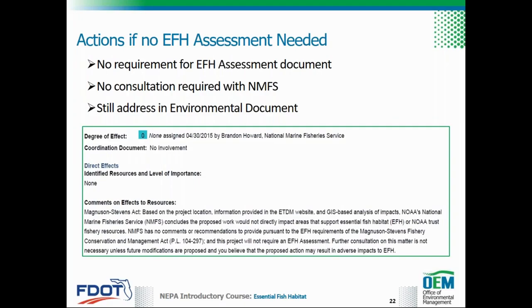If the project is located outside of areas where the Magnuson-Stevens Act applies, an EFH assessment is not required and consultation with NMFS is not required. For projects located in areas where the Magnuson-Stevens Act could apply, but the project will have no involvement with EFH or no adverse effect on EFH, no NMFS consultation is needed, but this should still be addressed in the environmental document.